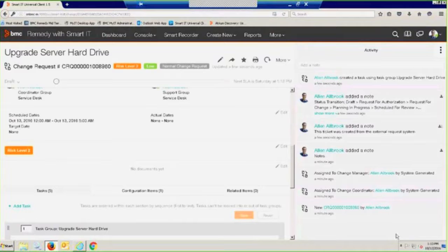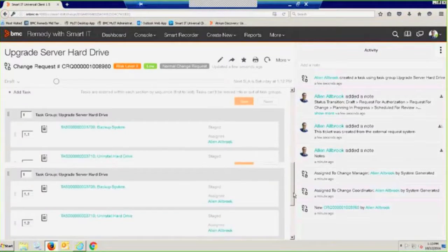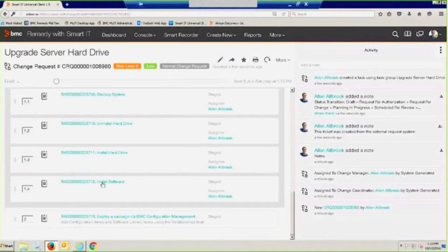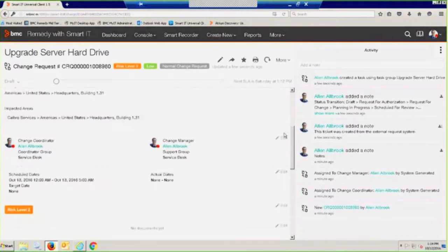Of course, as most of you know, in Remedy, we have forever been able to sequence those tasks if there's some reason you wanted to do that, or indicate that maybe the first 2 can be done in parallel, but the 3rd one has to be done before number 4. All of that, of course, is controllable. This, in effect, is the replacement of the work log you're kind of seeing over on the right.